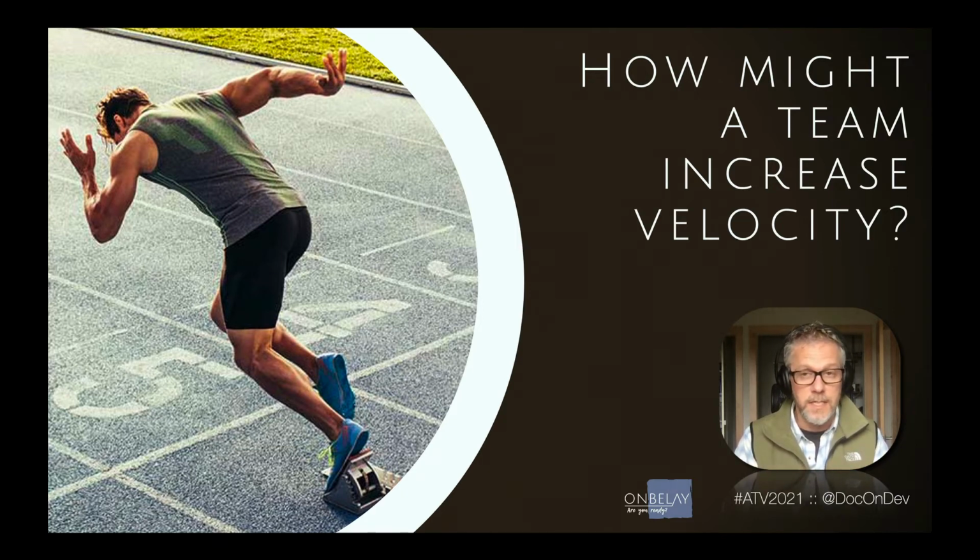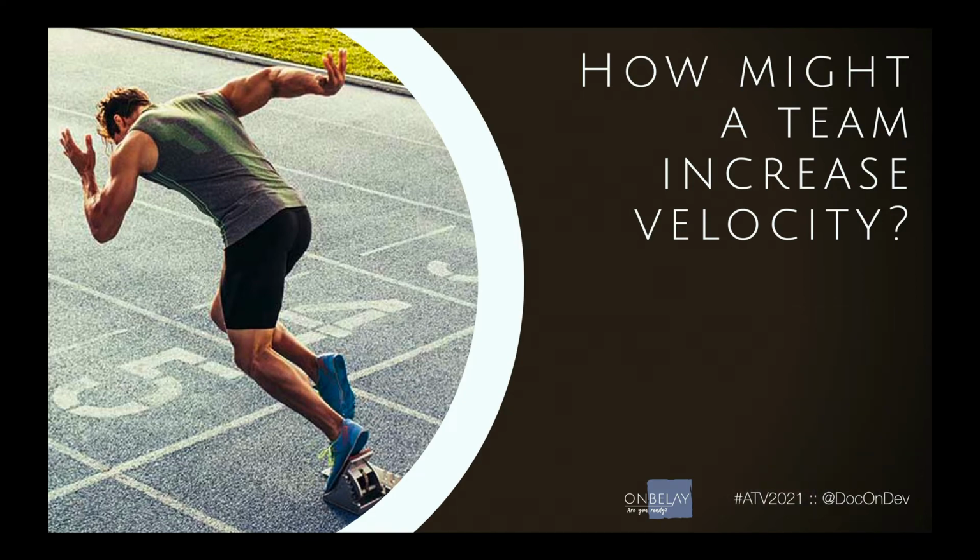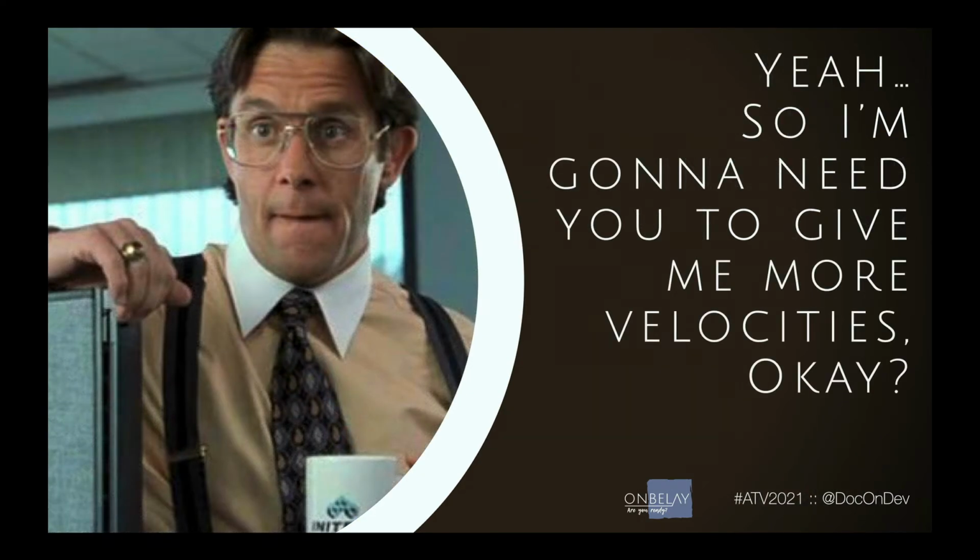Well, they might skip testing. They could cut corners on internal quality. They could work more hours per week, or they could increase all of their estimates if they want to take the really easy road. And again, the point here is the same, and it's still simple. Moving the metric in the desired direction doesn't necessarily improve the health of the overall system, and it might even hurt it. Now, this happens to us at work all of the time.